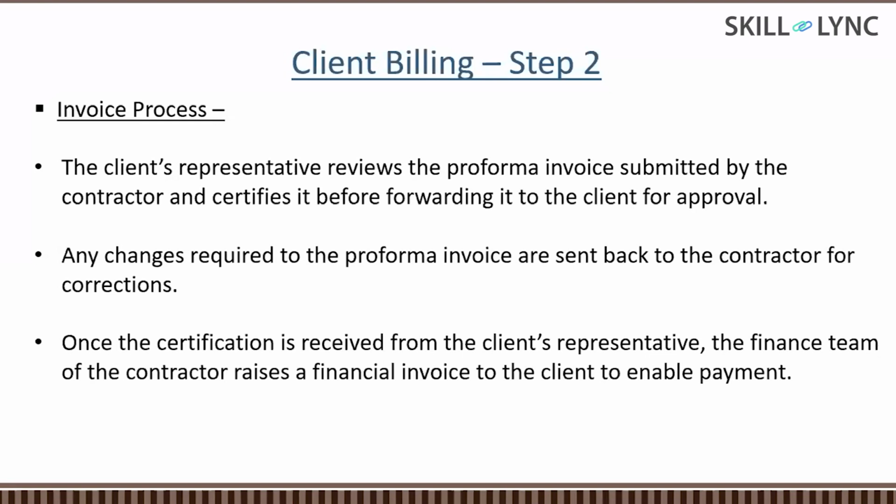Then he will help the client by providing all the documents during the checking process with the client. It will take another 7 to 10 days. All this time, the billing engineer will be involved with the client if any help or support is required for the vetting of this entire bill. Once the client is satisfied and has checked all the bills, then he will certify it and process it to the finance team for the payment.